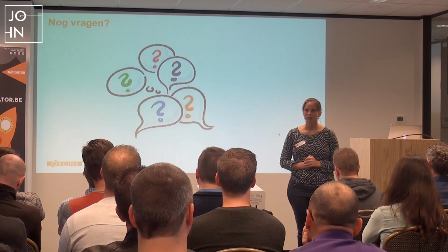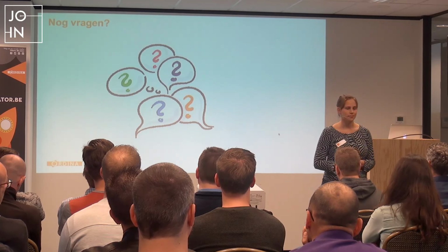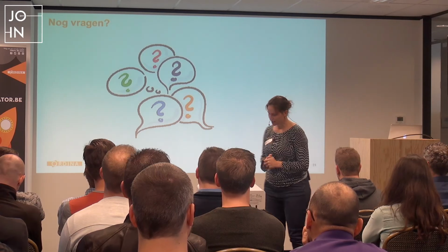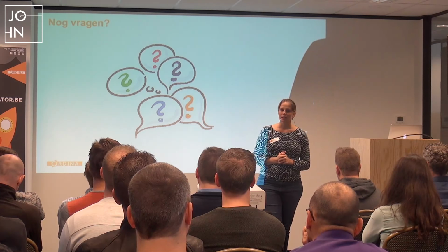Dear stakeholders, please state your interest in this product. Please state how you want to be informed and when. And if I don't hear from you in the next 2 weeks, you're not going to receive any more information from me. I heard back from 15 stakeholders. So, that's a nice way of reducing that number.